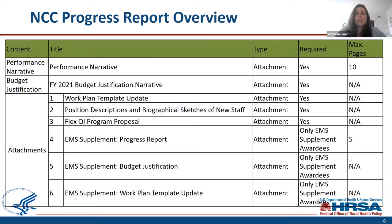As an overview of what to expect in your progress report: you have the performance narrative, a budget justification for year three FY 2021, a work plan template update, and updates on position descriptions and biographical sketches for new staff or vacant positions. We also have the Flex QI program proposal, which I'll get into in more detail later. For the eight of you who are awarded the EMS supplement, you also have to do a progress report, budget justification, and work plan template update specific to EMS.